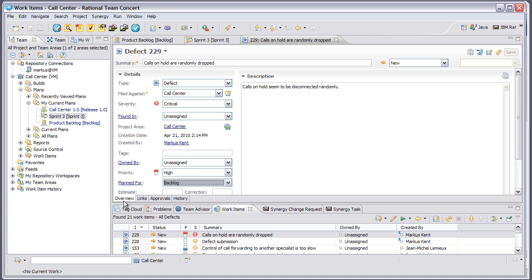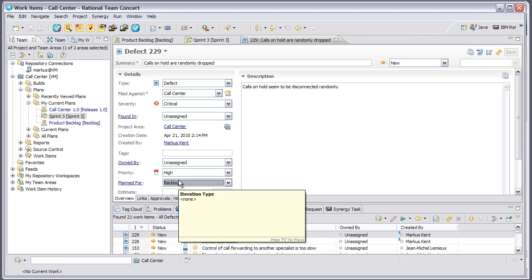Now, as a team lead looking at this change request, I see that it's currently unassigned and planned for the backlog. But since it's a critical defect, I'd like this to be fixed in the next iteration.